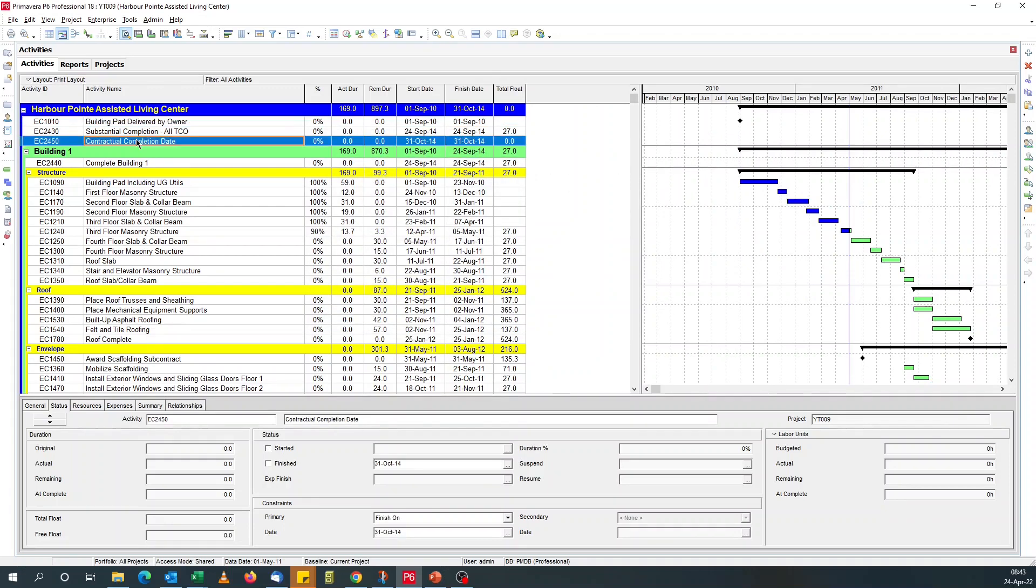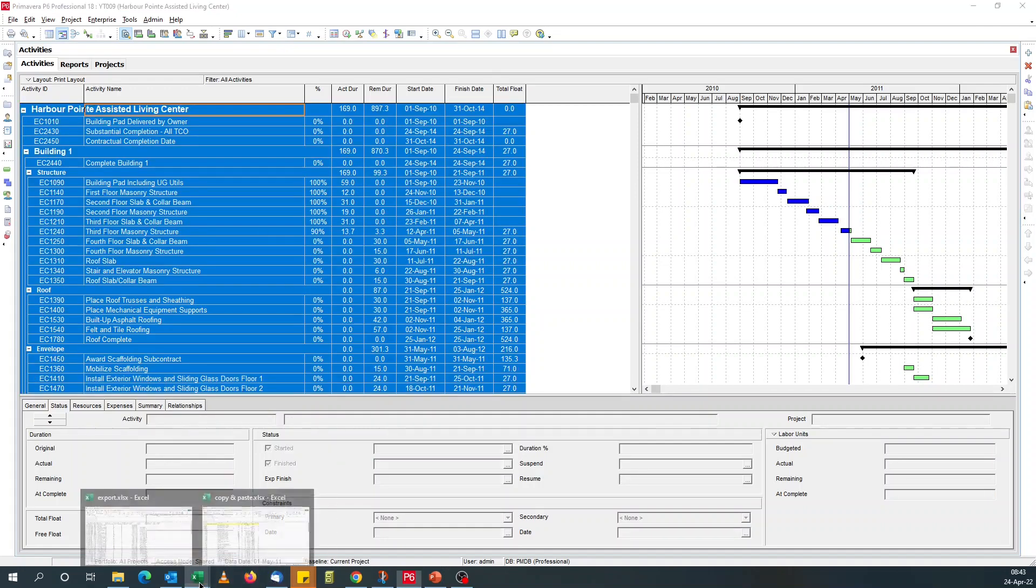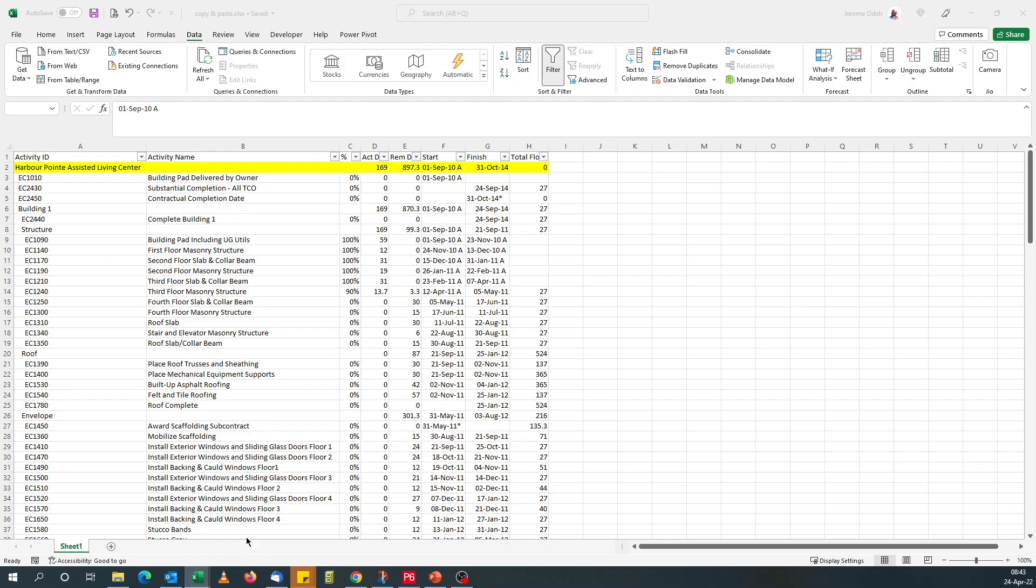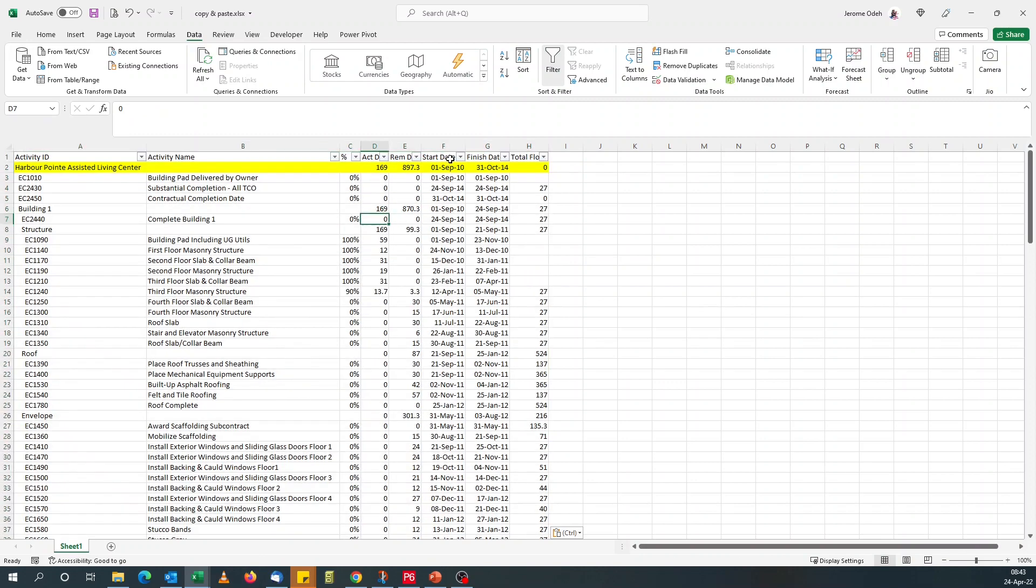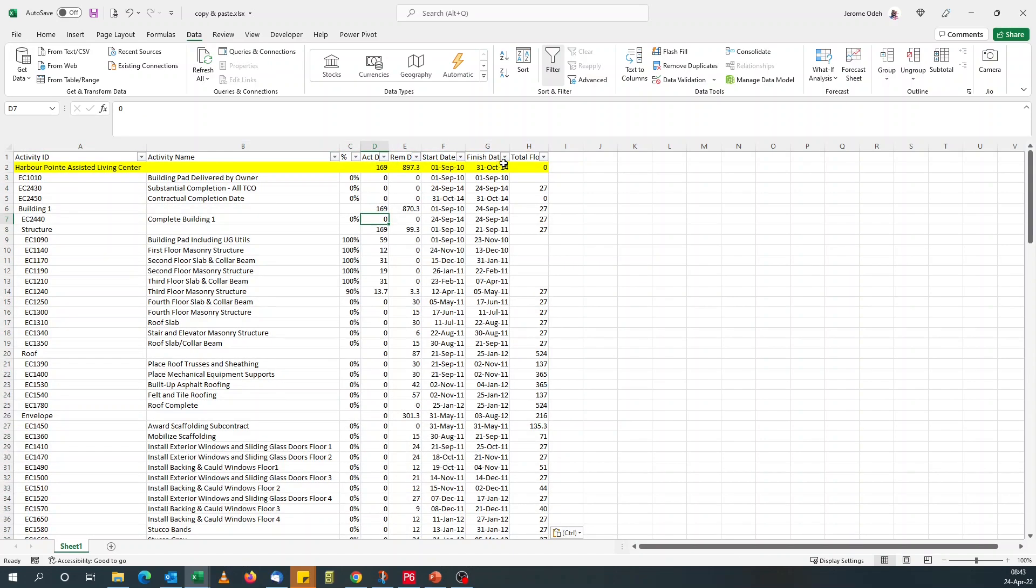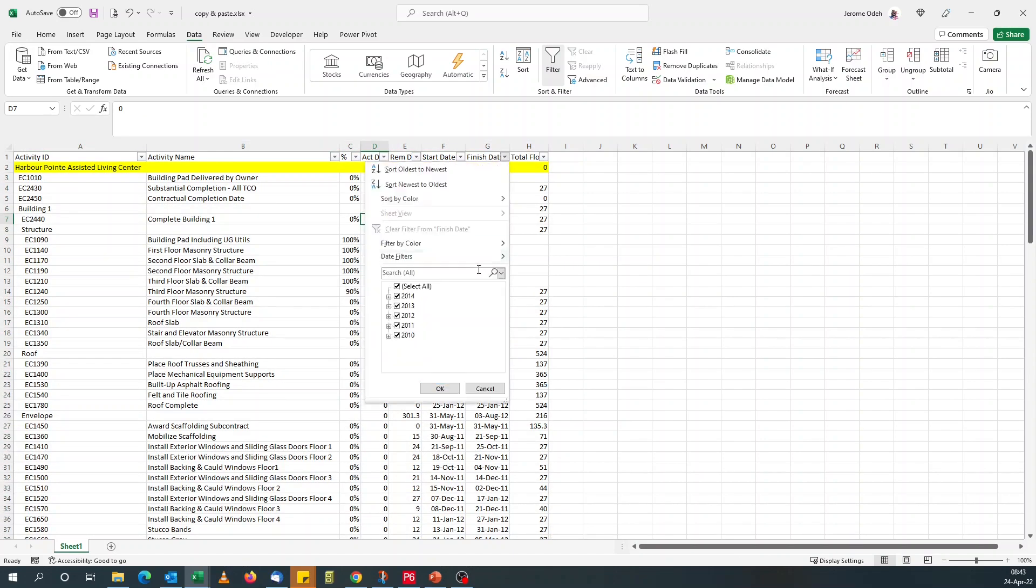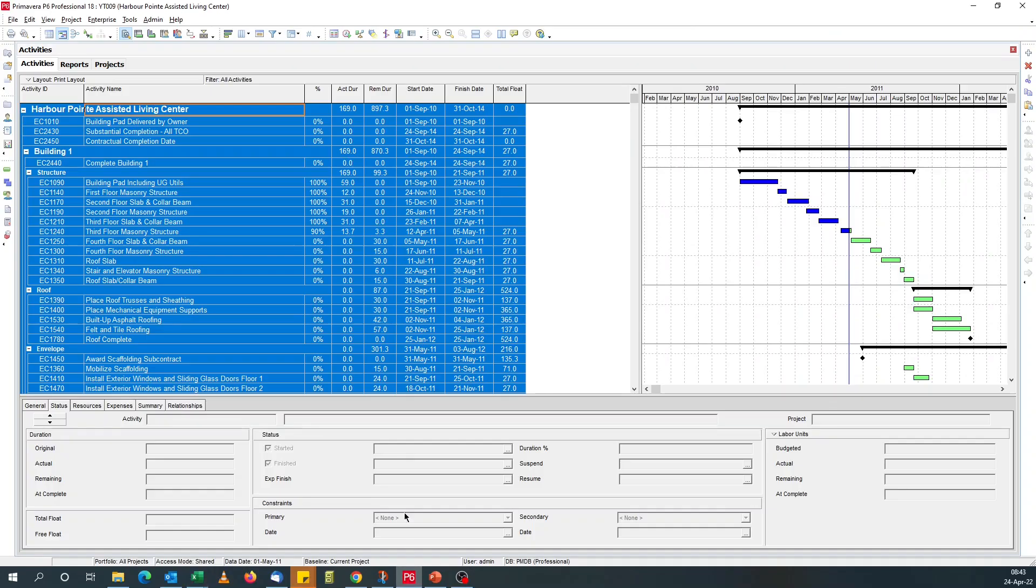So if we copy this now. Go back to our copy and paste. You see this has an asterisk. We don't want that. Paste. And you see straight away, we have proper dates. And that's it.